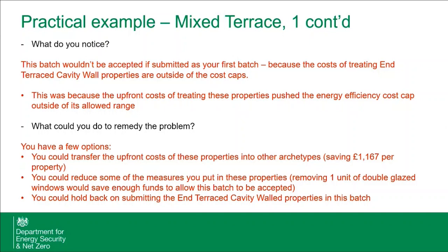Yeah, exactly that. It's also worth noting that you can reopen batches at a later point in time. I know that there's been some conversation in the past about, can we add more measures later on? Where you have allowable costs and there are some homes where you feel like you can do that, and you have allowable space in your headroom where you have a bit of extra space in some of your cost caps, you can, of course, go back and add additional properties as needed.